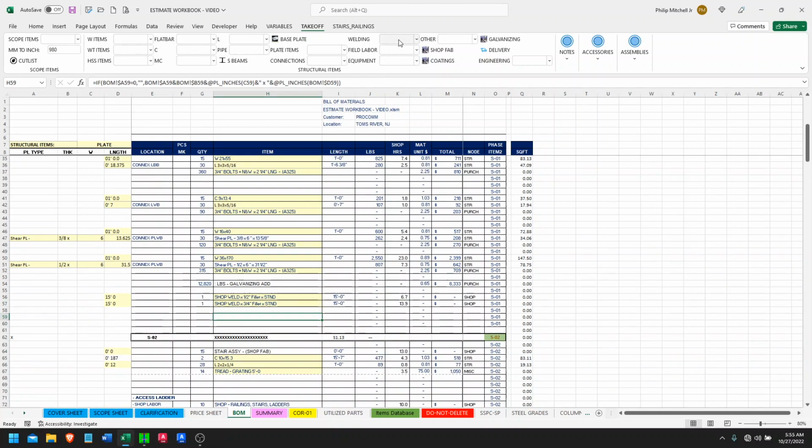And with the welding, like you saw, every one of these is another option. So we have standard, now we have shop. Is this a vertical weld? Is it an overhead weld? Then you have field: standard, typical, waist level, normal. Then is it a vertical weld? Is it an overhead weld? So you'll have every one of these options in a vertical and an overhead, and then the hours associated with that work activity would be accounted for in that scenario.